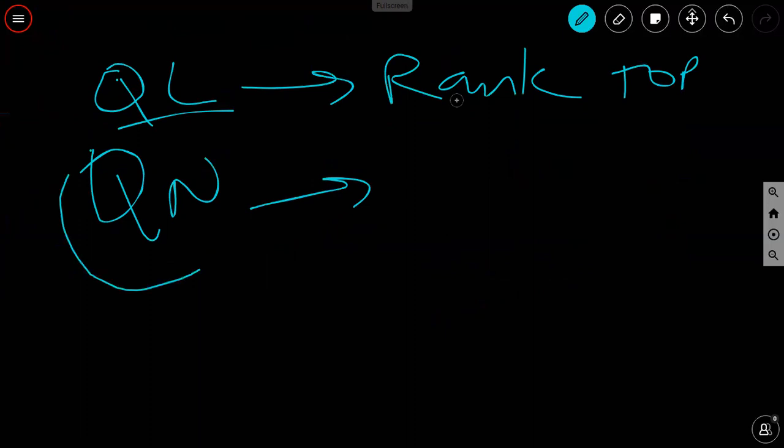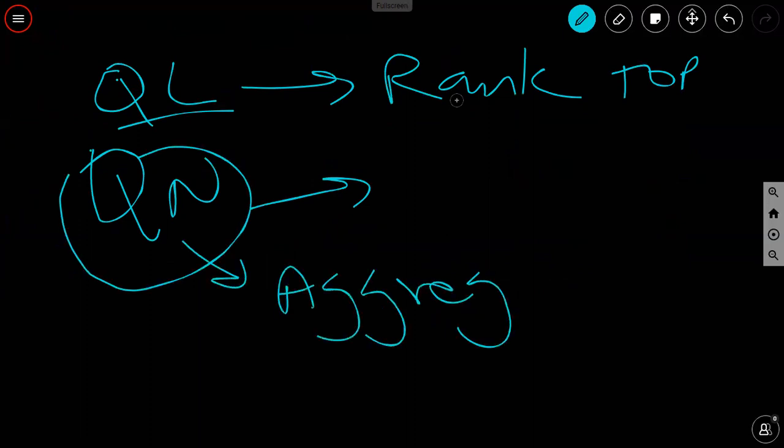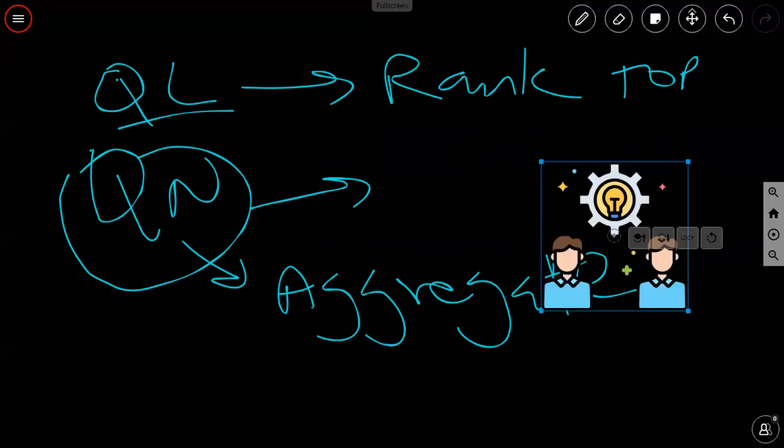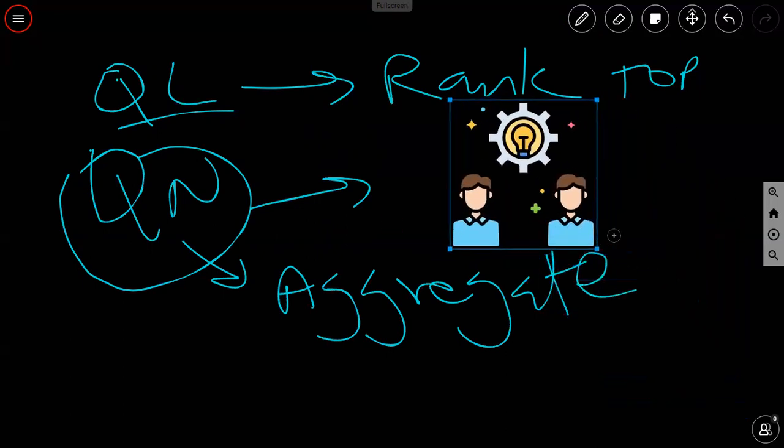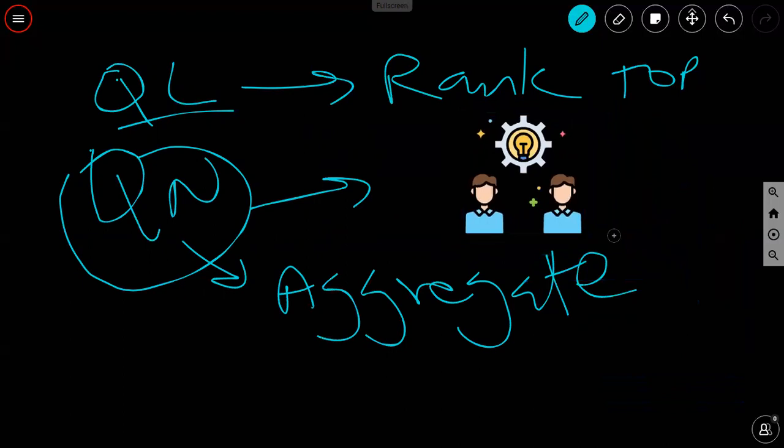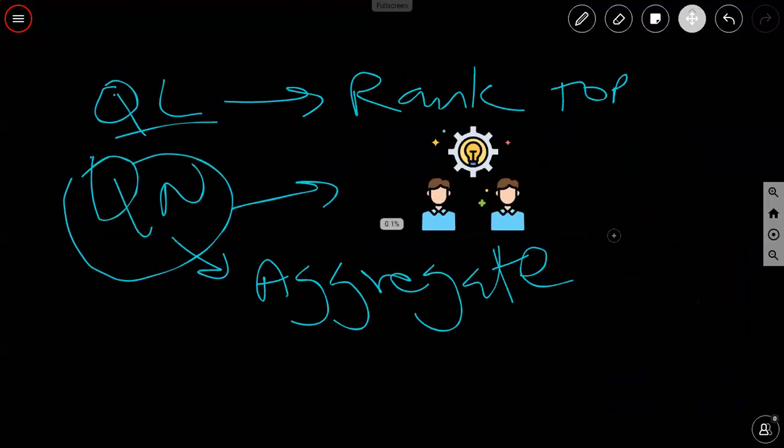But the key thing about quantitative is it helps you see the aggregate effect of risks on the project. Imagine these risks come at you. What will be the impact if these things happened in different combinations? And this is best seen in a Monte Carlo. Okay, so you've got to understand the purpose of the Monte Carlo.